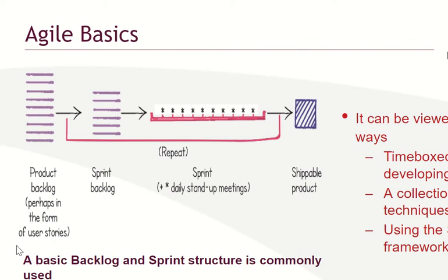And I've given you an example. Building a bungalow and all the features that should be there is a backlog. A sprint will start with fencing the compound, the land itself. That can be one sprint. That is, a user story is: I want to be able to enter into my land through a gate.